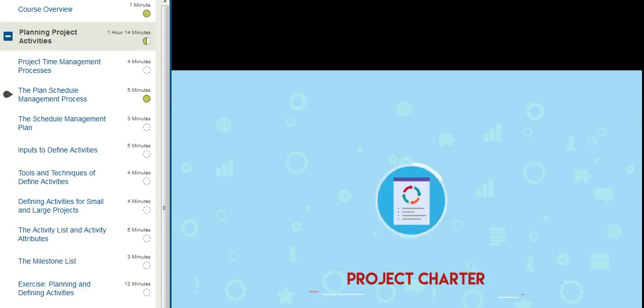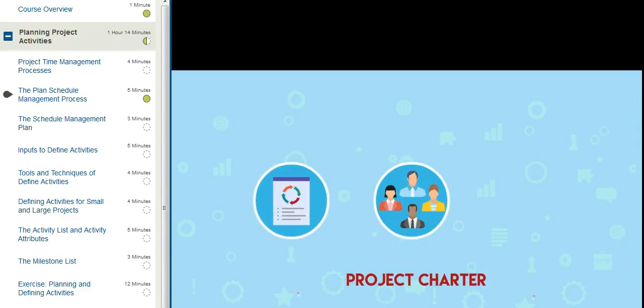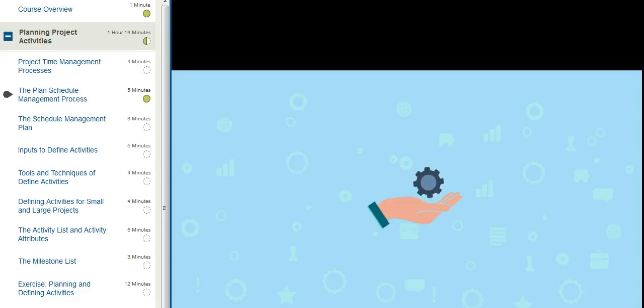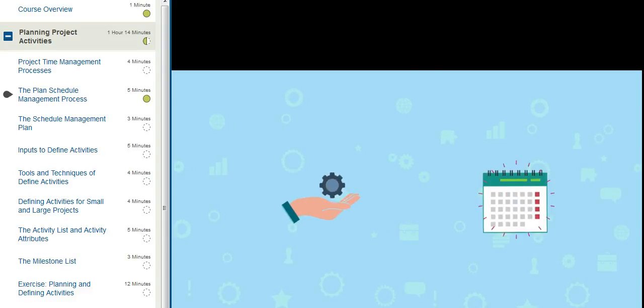The project charter contains a list of the key decision makers and the decision-making process that defines how project changes are approved. This information is necessary when you are planning how to manage and control any required changes to the schedule.